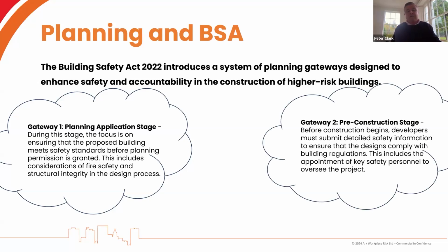But gateway 1 transfers into gateway 2. Again, we're pre-construction here. And that's the message, I guess, from these gateways: getting things right before we start is crucial. Getting things right means getting the design right, getting the structural integrity correct, getting the materials correct. So there's now secondary legislation to the Building Safety Act, which brings in requirements for material testing, which, again, you'd think in an industry like ours would have been there already. It wasn't. It's there now.